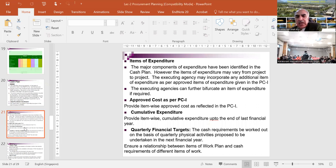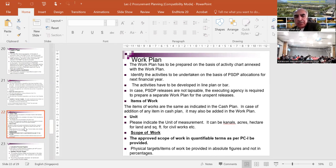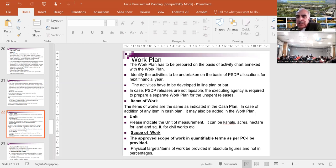We have different kinds of information: the item, approved cost, cumulative expenditure during last year, and quarterly financial targets. Based on the activity plan, we develop the work plan. For example, what will be our targets in the first quarter - perhaps we assign the consultancy contract. By the second quarter, we complete the design process and pre-qualify contractors. In the third quarter, work starts and is completed up to a certain level. Based on activities defined in the activity planning, we develop the quarterly work plan.